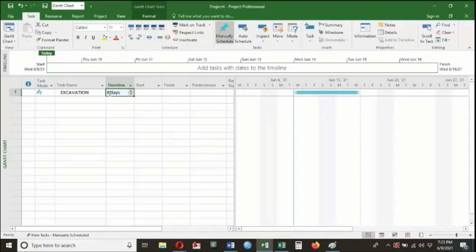Now class, if you want to put any other unit of time, you can change that also. Some things are in minutes, some things are in months, days or years. You can change this. So how? There are two ways. Either you can write something like 6 then MIN. Caps lock on or off doesn't matter. MIN means 6 minutes.